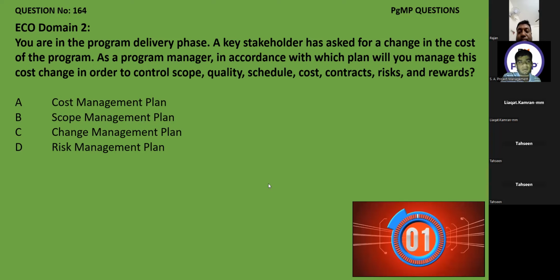Yeah. And one more important thing, you will get a lot of questions. Just keep in mind, whenever the question talks about how you will manage the cost change or any change, that will be as per the change management plan. If it asks how you will manage the schedule change, it will be the change management plan, not the schedule management plan. If it asks how you will manage the quality change, it will be as per the change management plan. So any change will be as per the change management plan. Just remember this. Is it clear? Yes, clear. Good. So it's very important. Next question.